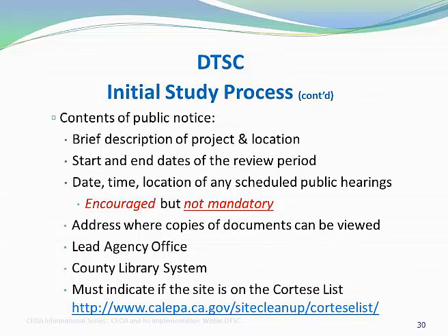This notice must indicate if the site is on the Cal EPA Cortese list of hazardous substances sites. The Cortese list is available on the Cal EPA website. You'll need to check all 4 lists within that site. If you need help locating the Cortese list and going through the sites, just give one of our planners a call and we can walk you through that.